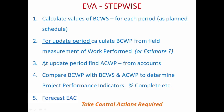At the same update period, find actual cost of work performed (ACWP) from the accounts. These then give the basic parameters for earned value analysis. Compare BCWP with BCWS and ACWP to determine the project performance indicators and the percentage complete of the project.